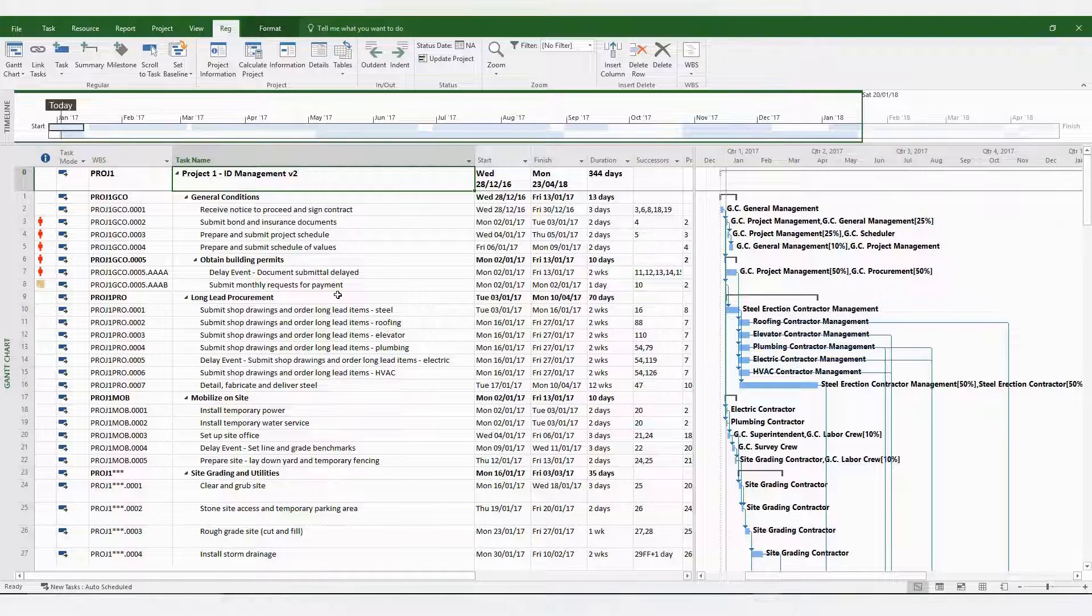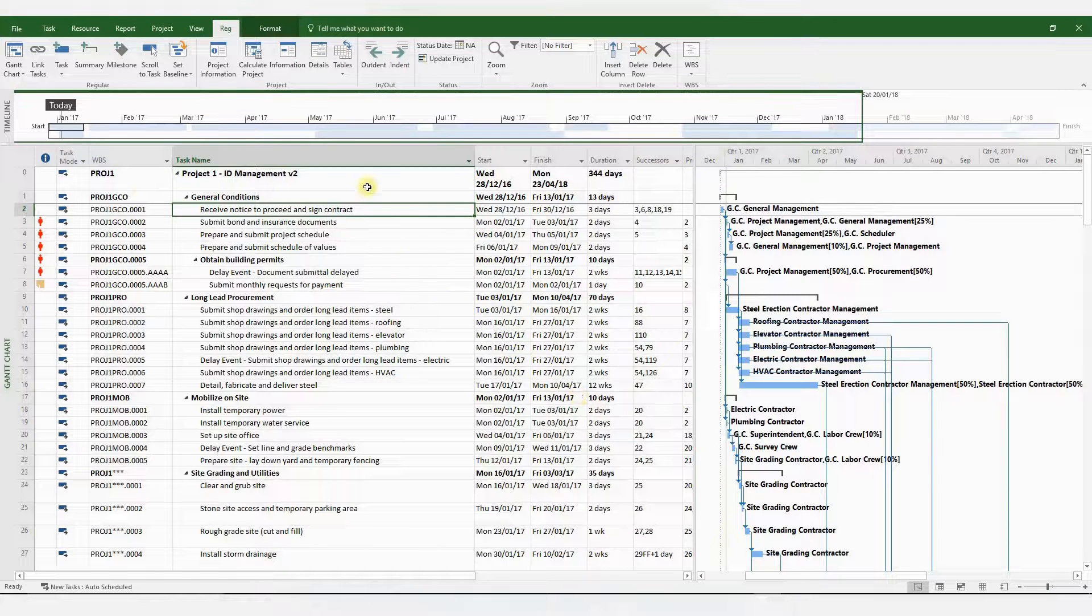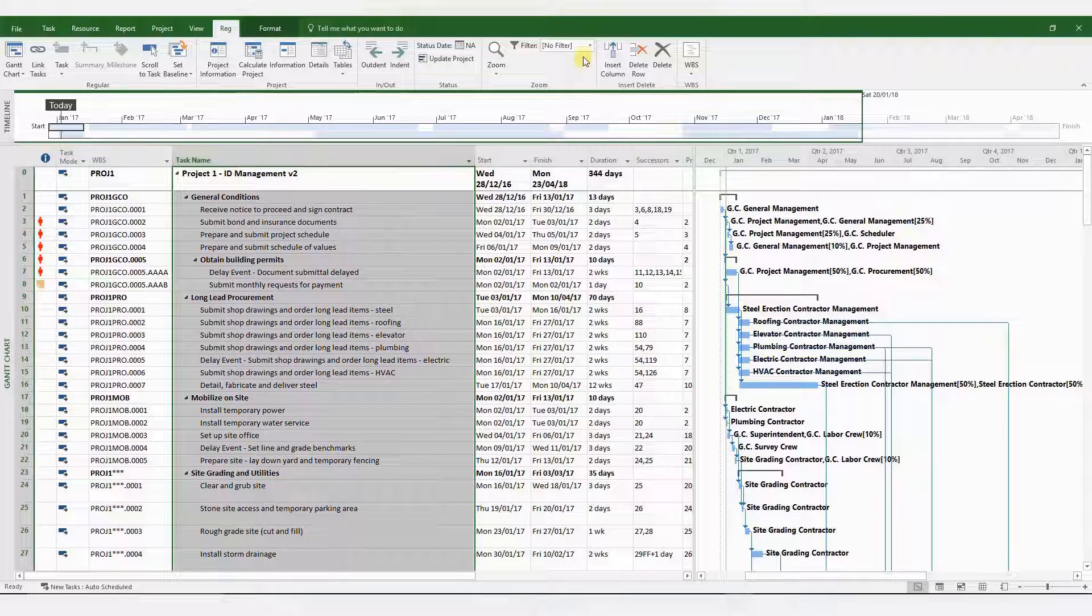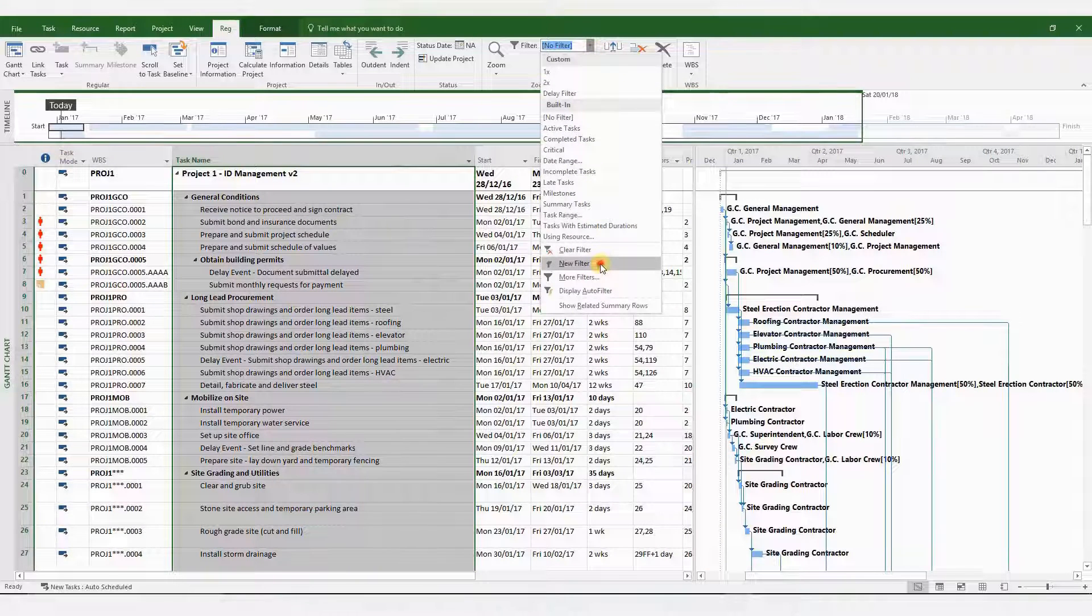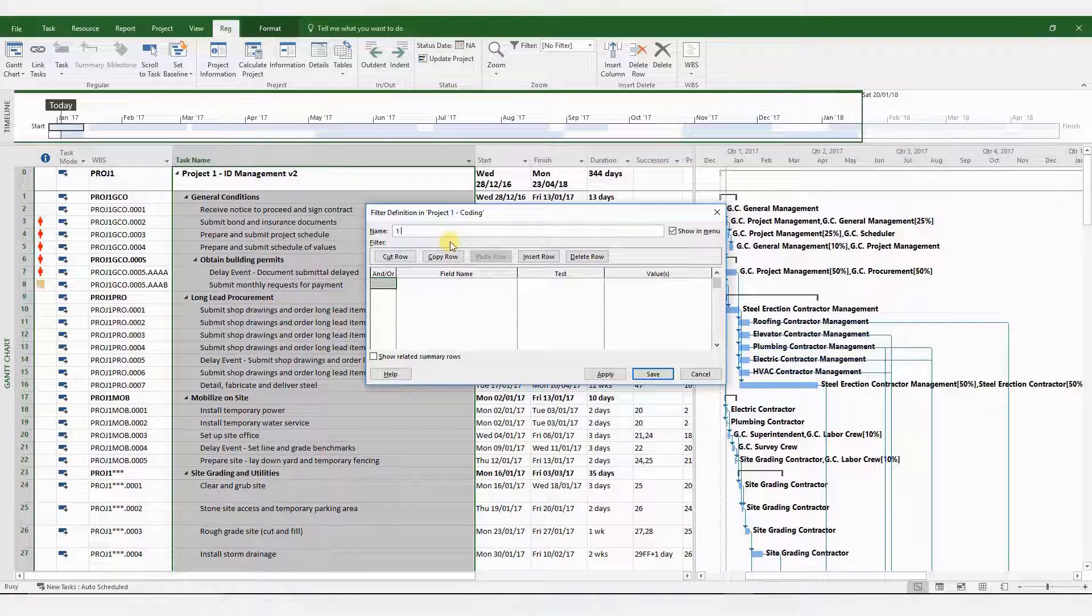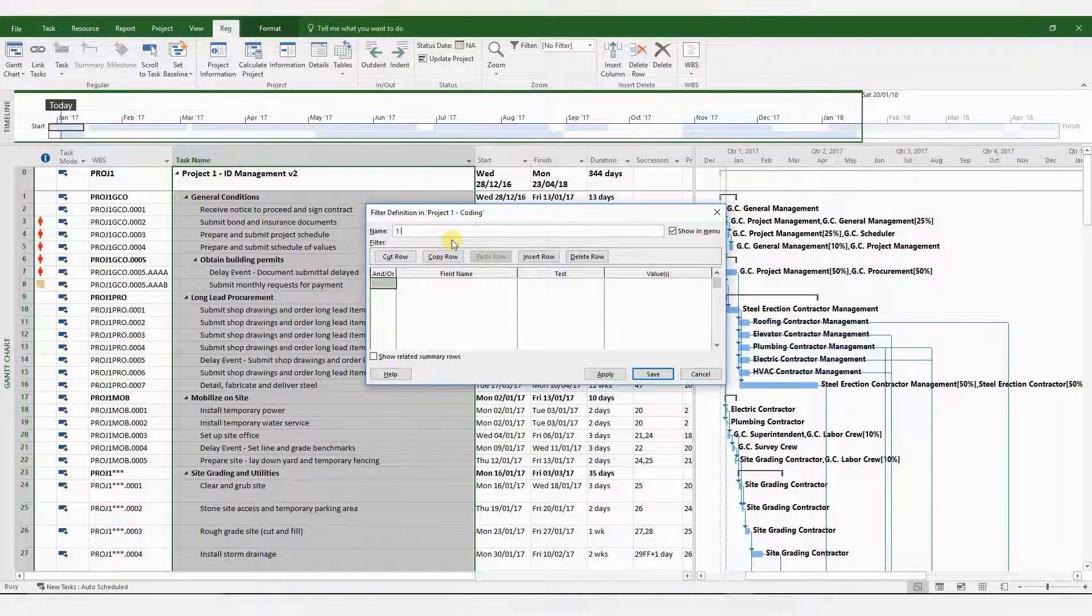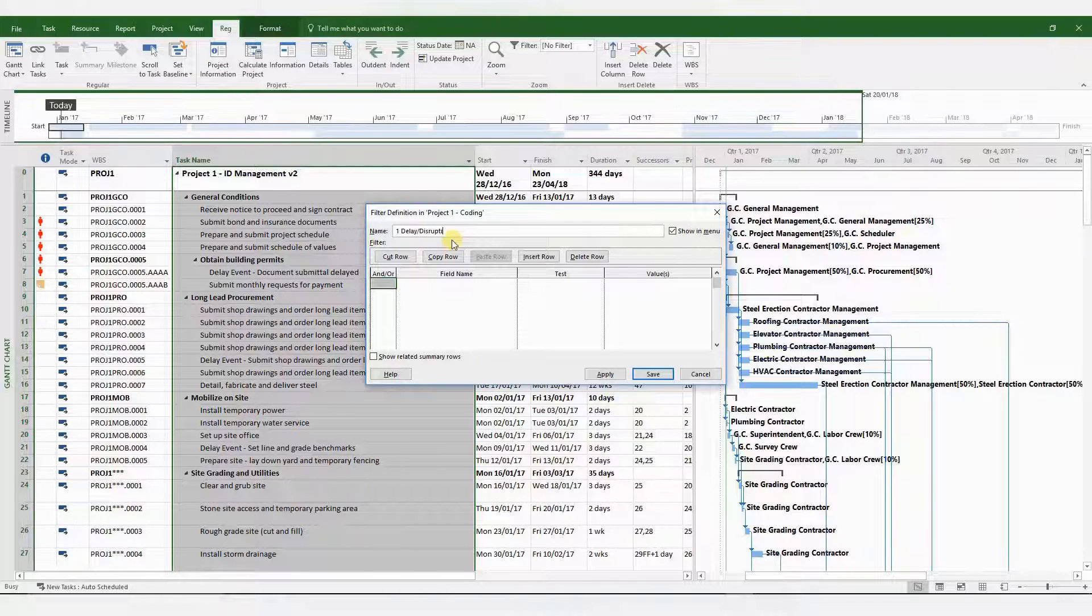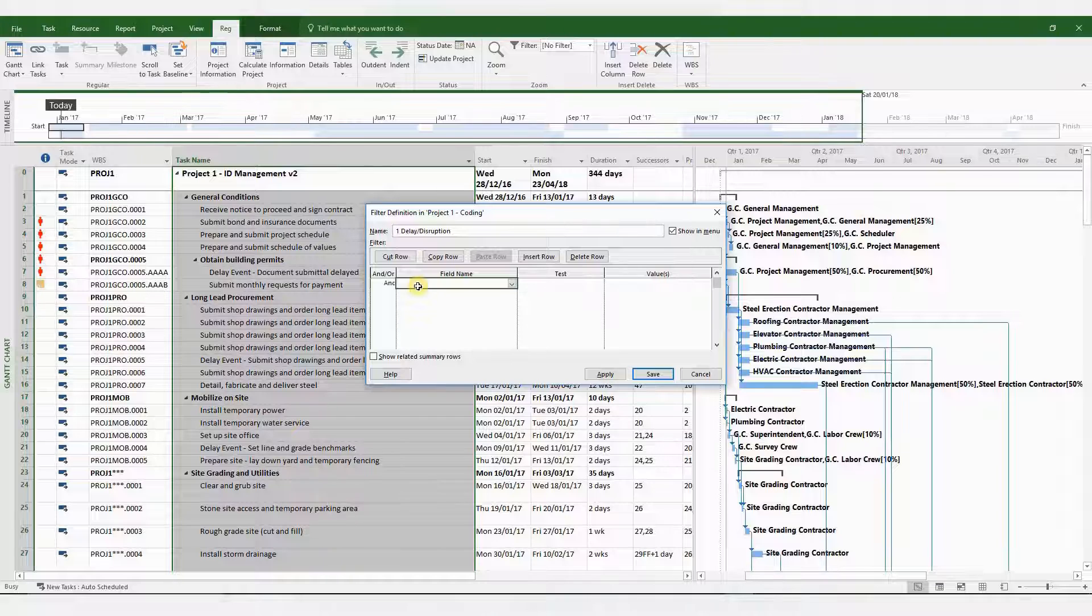So these are the steps that need to be undertaken. First of all, create a filter to identify all the hidden delay or disruptive events within your tasks. So let's do that. So this is a customized filter. You can create as many customized filters as you want. I'm going to create one for delay and disruption.